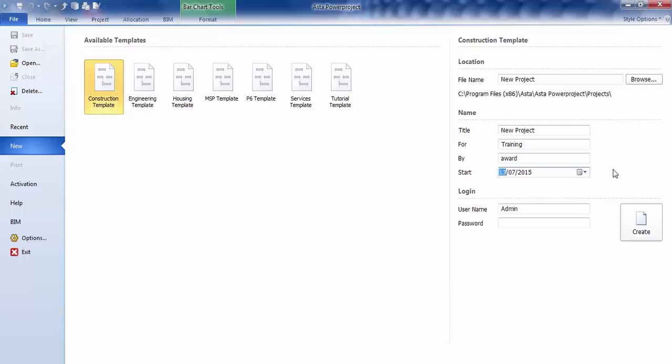And that's something worth keeping in mind, that once you've created a project and you've got it linked, etc., and then you're given a different start date, you can change the start date of your project whenever you like, and then when you press the reschedule button, the project will recalculate itself and move to that new start date, whether it's forward in time or backwards in time. So you're not necessarily stuck with the start date that you start with.